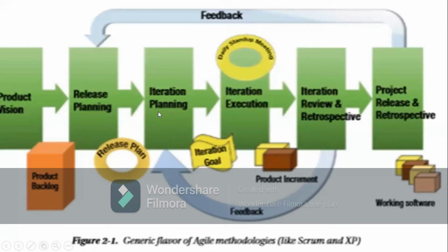If not, and it's a change request, we add it into what we call product backlog grooming, because we cannot go ahead and work on it since it will affect the other iterations. So we put it in product backlog grooming, to be considered later, and an effort sizing is done in terms of time and cost and how it will affect the scope.